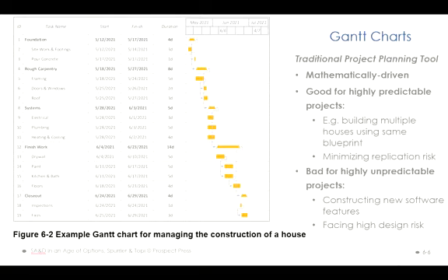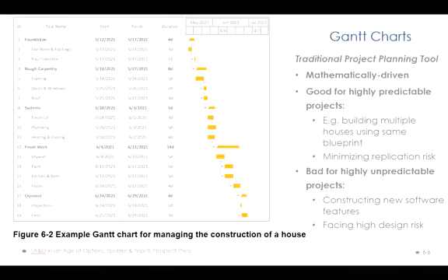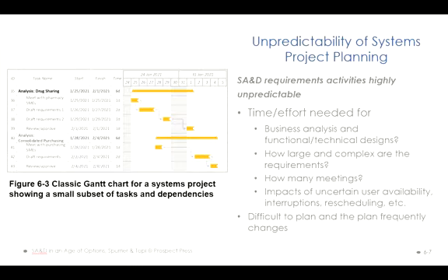However, on the other hand, the software project that we are dealing with is slightly different. Software is a lot of the time a moving target. When you are dealing with a moving target, the user requirements keep changing. This type of project is not so easy to map into a Gantt chart. But of course, a Gantt chart can be modified to accommodate some uncertainty.